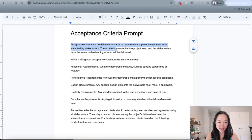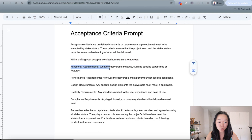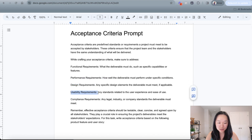Firstly, I get into a little definition of what the acceptance criteria is. Then I tell ChatGPT, while crafting your acceptance criteria, make sure you keep these in mind: the functional requirements — what the deliverables must do; the performance requirements — how well the deliverables must perform under certain conditions; the design requirements — any specific design elements the deliverables must meet; and the usability requirements — any standard related to the user experience or ease of use.